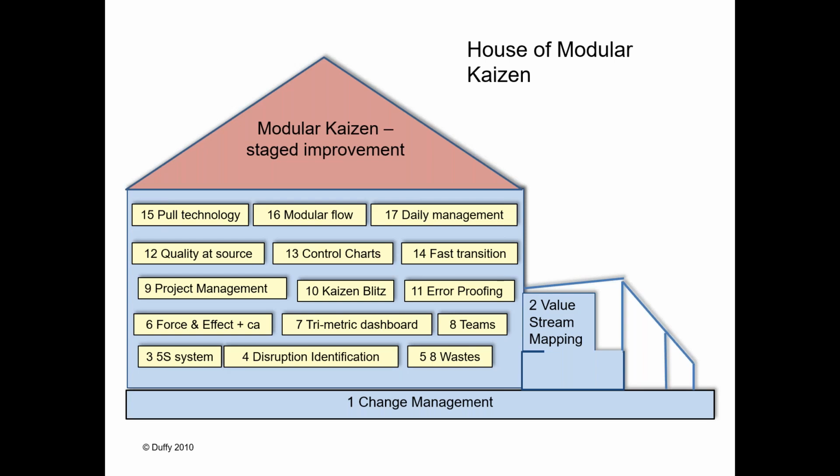If you think of Legos, a project is like a bunch of Legos, and a facilitator and team leader have to look at the individual tasks. It's like when you put a Gantt chart together, or when you put a work breakdown structure together, you are modularizing. You're using modules of the process. You are making smaller pieces of that greater whole. And that's what I have in mind when I talk about modular or when I modularize a project. I take those smaller pieces because those smaller pieces can be sub-processes, they can be tasks within processes, they can be the things that we call a work breakdown structure or the tasks that we put into a Gantt chart.